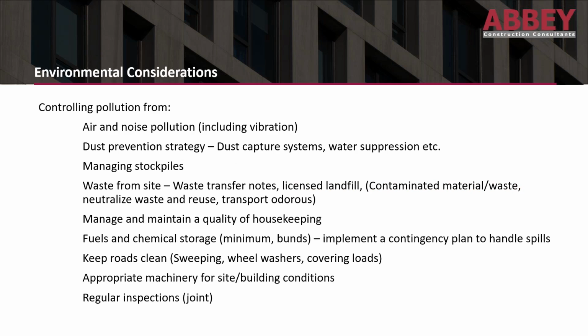Let's not forget environmental considerations, which is controlling pollution from air and noise pollution, which would include vibration. Dust prevention strategy: as part of your rules, are you saying they have to have a dust capture system or a water suspension system? Are you saying that they have to have limited stockpiles so they can't block the client's site up with multiple stockpiles?